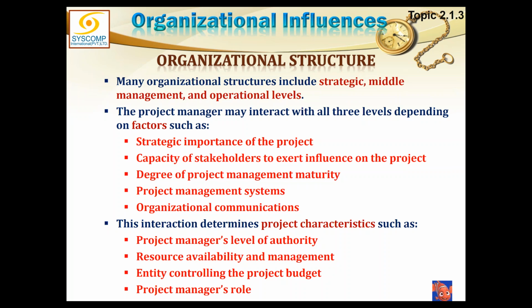It will not be a projectized. Projectized has its own resources. You will have your own factory, as you were saying earlier. For a strong matrix situation, you'll have to have a very robust production management, because there will be conflict of interest between project X and project Y. Obviously, they have to schedule their manpower. So projectized is a dedicated thing.